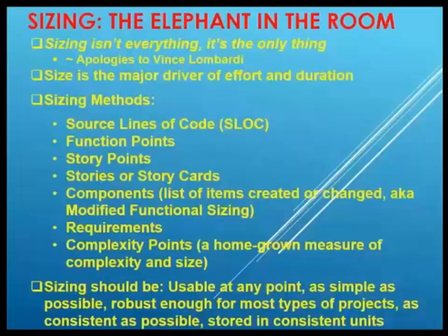So if we do size something based on function points, we'll apply a gearing factor to get it into the same units, the implementation units, and we store the implementation units in Data Manager and in all the other SLIM suite of tools.